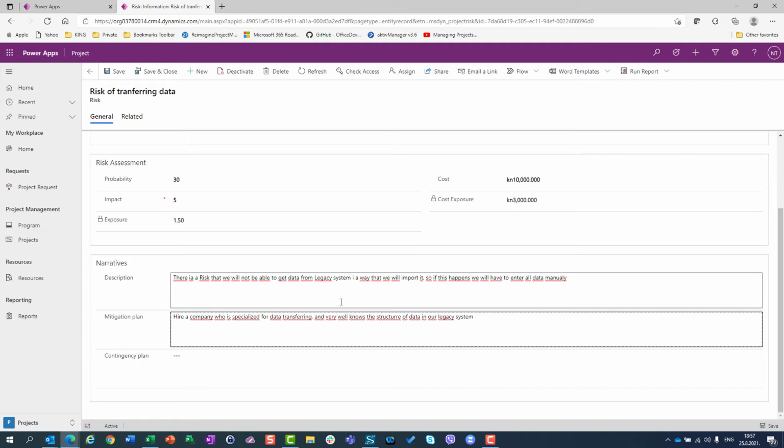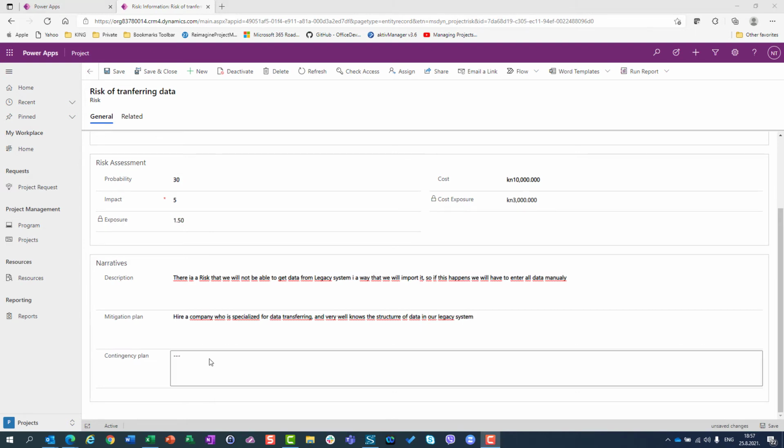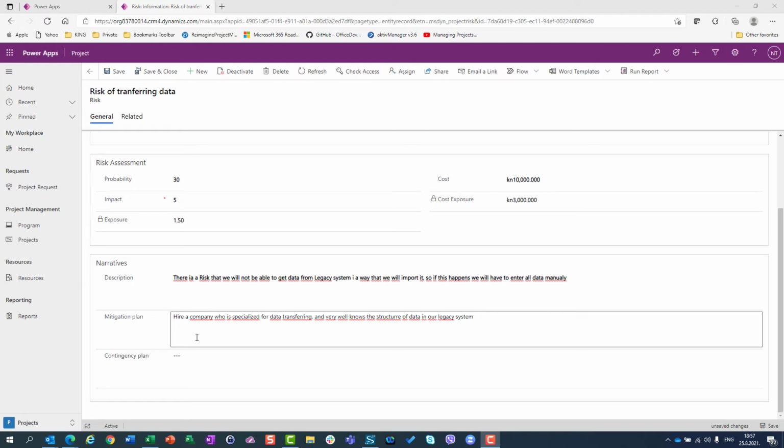Okay. And then we have mitigation. Mitigation means that you are going to decrease either probability, or impact, or both of them. What can we do in my example with the sharks to decrease probability? We can, let's say, feed the sharks 100 meters, or let's say 1 mile away from the testing area.